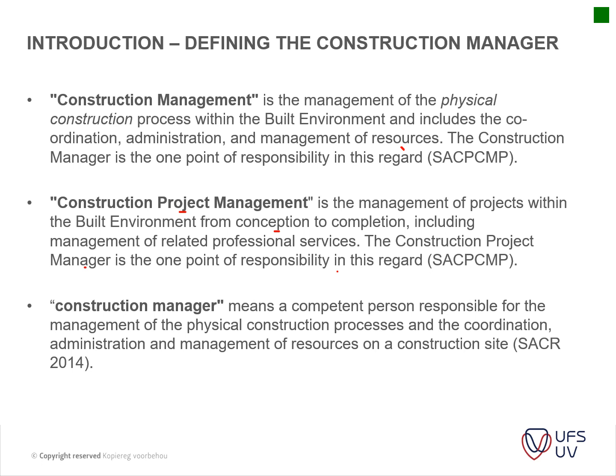Another definition to differentiate between the two is that the construction manager is usually involved from stage 4 to 6, whereas the construction project manager is involved from stage 1 to 6, and fulfills a consultant type of obligation.